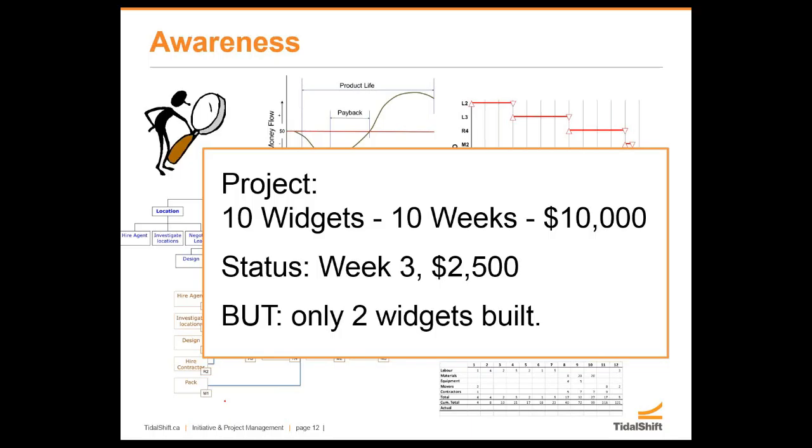And then I cover up, and so we have this discussion around earned value, and we look at running the technical process stuff, and then I back up and I say, okay, week 3, $2,500, how are we doing? And I'm amazed at the number of people who still, after looking at it, come back and say, oh, we're under budget. Meanwhile, the scenario hasn't changed. What I've done is I've reduced your awareness because I took away a key piece of data. So you really need to think about what the data means. What do those numbers mean? And not just blindly run them through formulas, right? Really step back and put that in logical terms, right?